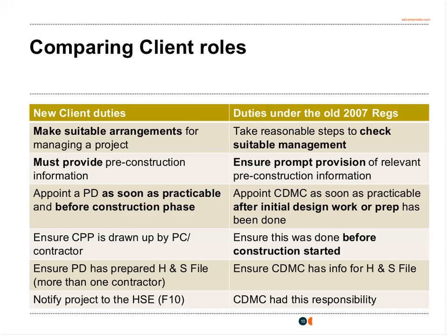The next obligation is the key appointments that the client must make. The client must appoint the principal designer as soon as reasonably practicable and before the construction phase starts. That compares to the 2007 obligation, which was to appoint the CDM coordinator as soon as practicable after the initial design work had been done. Now the focus really is on the client making sure those appointments are put in place as early as possible.